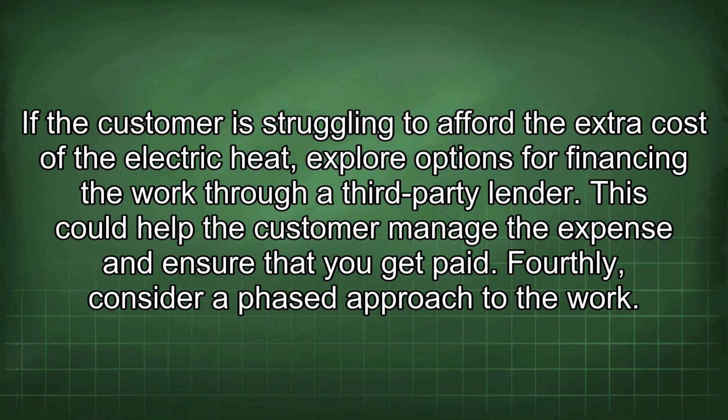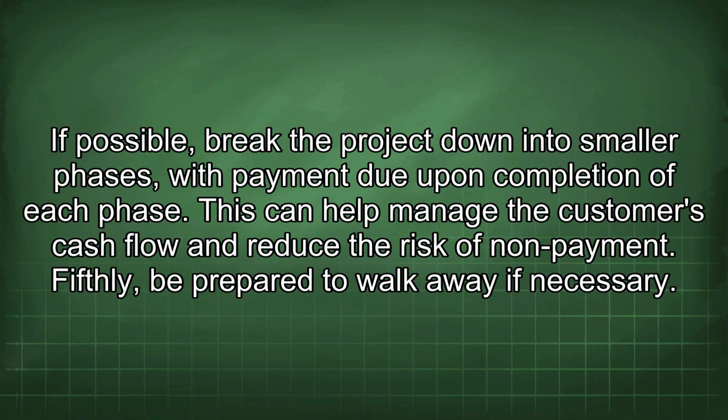Fourthly, consider a phased approach to the work. If possible, break the project down into smaller phases, with payment due upon completion of each phase. This can help manage the customer's cash flow and reduce the risk of non-payment.